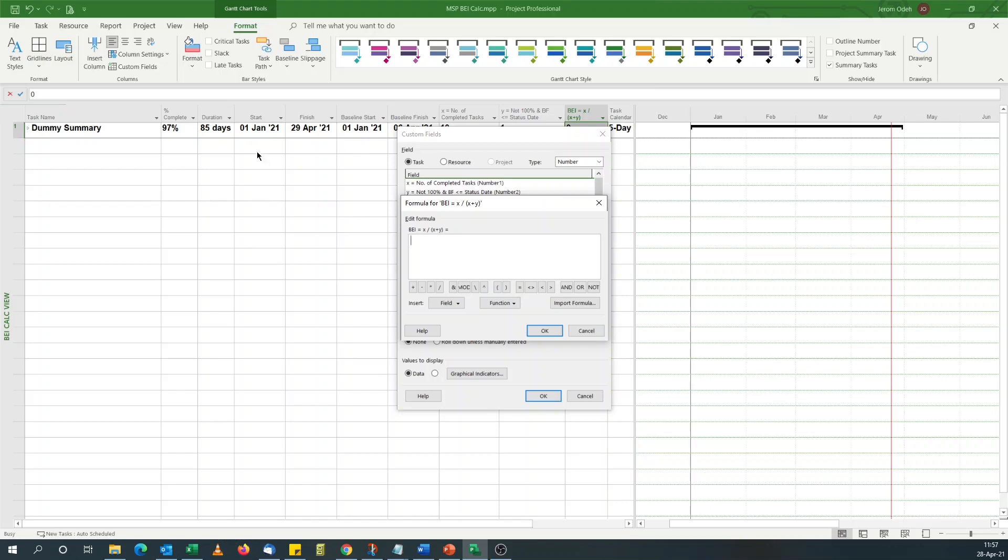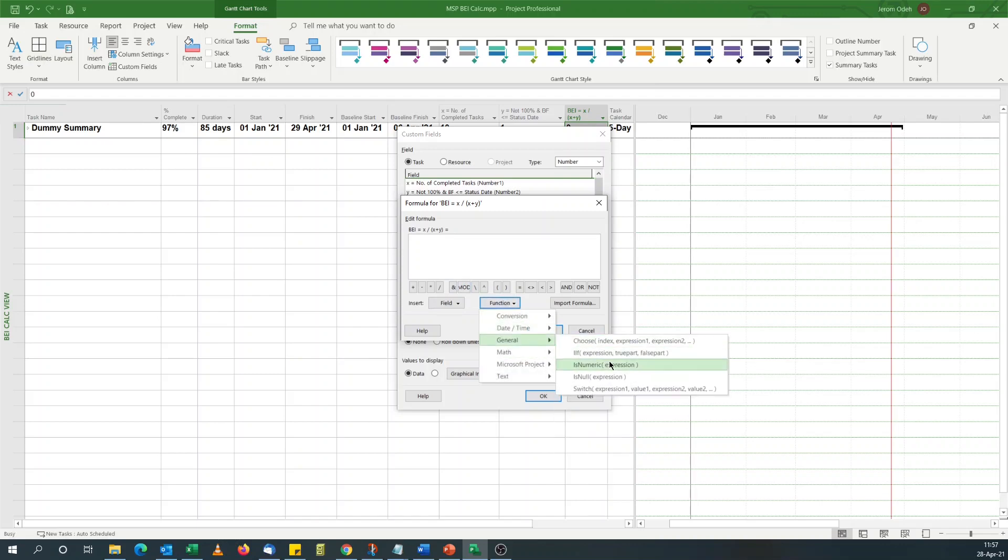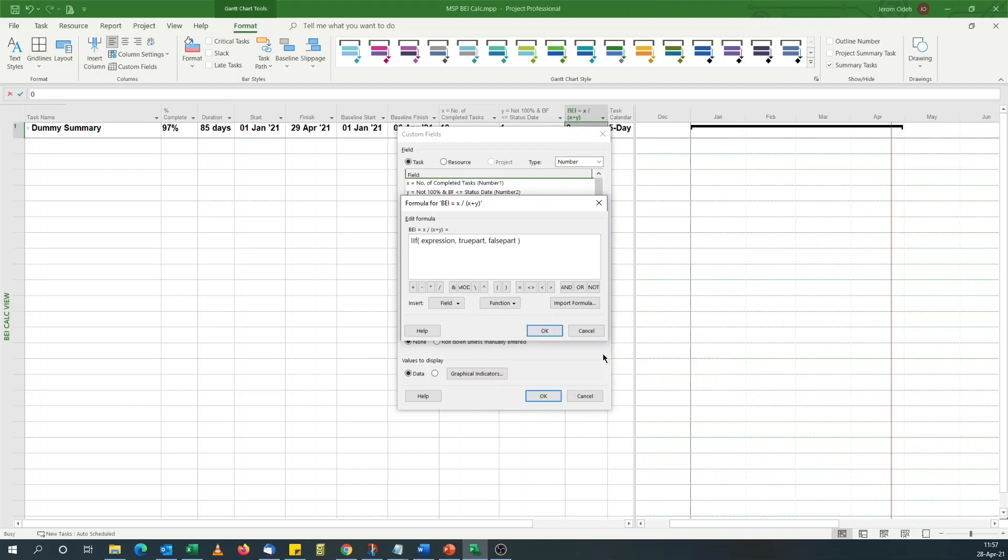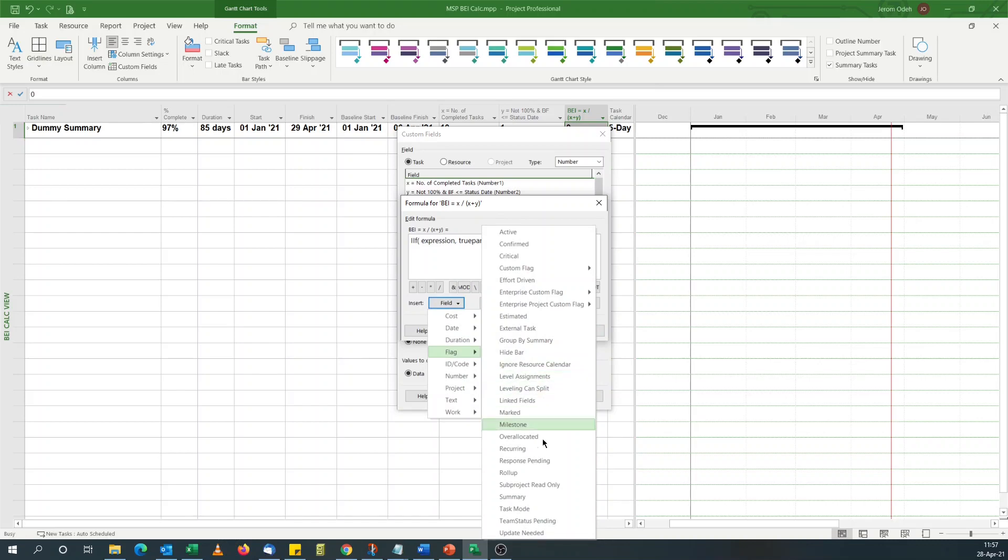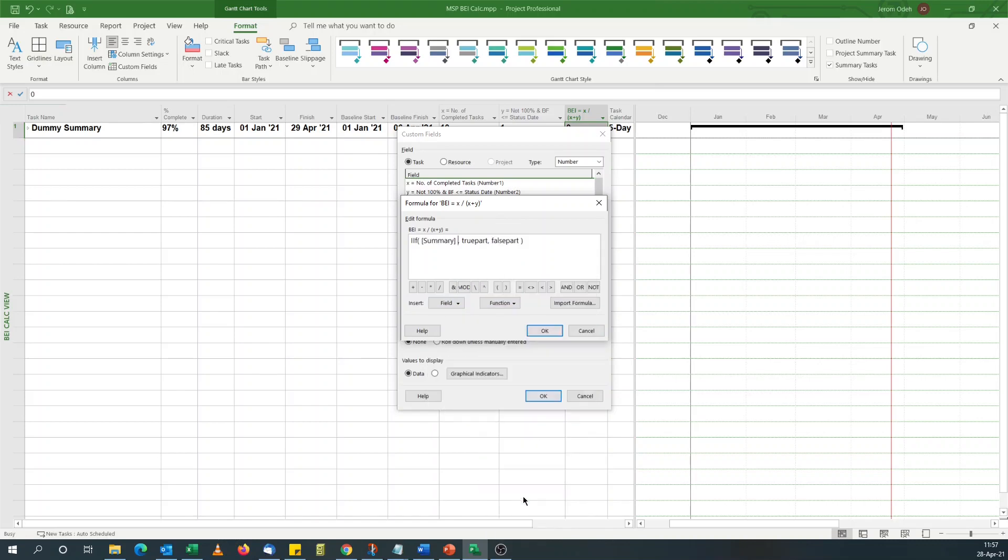The formula we want is X divided by X plus Y. Because we're dealing with summary level activities, I'll go with an IF statement again, so that we don't have a divide by zero, which comes into play for milestones. If it's a summary activity, then we do this calculation.